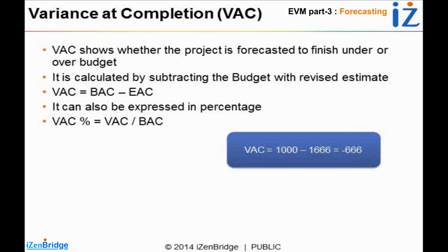It does not mean that the project manager is doing well if he is achieving EAC. But if you have a revised BAC, it means that we understand the situation. Management has approved that this project can be rebaselined. It is not going as expected, and the project management team has less to do with the cost variances. It is basically influenced by the external environment. So this is another trap which you might see in your questions.